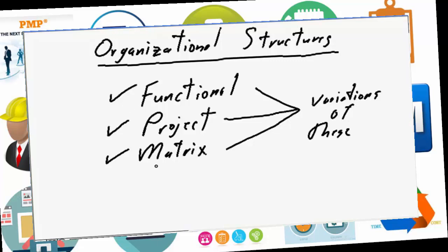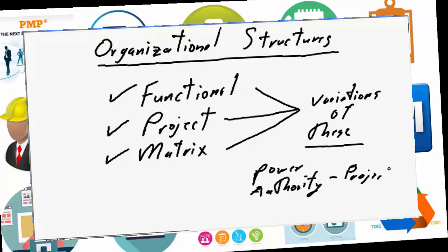So within an organization, within a specific project itself, you're going to see very different organizational, functional, project-based, matrix relationships based on each individual specific project requirement. It's important that you understand which combination of functional, project, matrix-based environment you're going to be operating within, because it is going to determine your power and your authority within which you can affect project success.